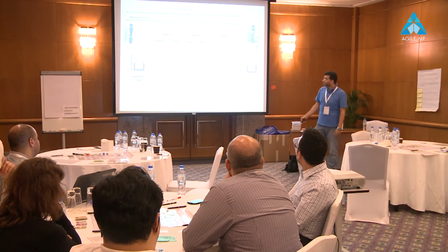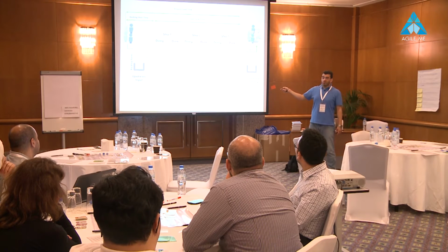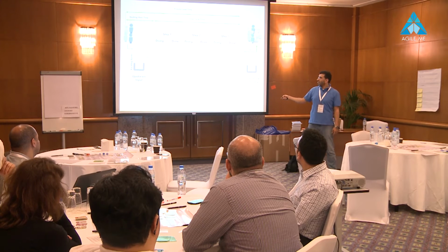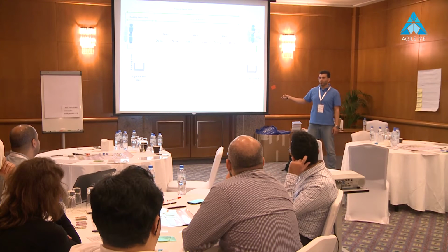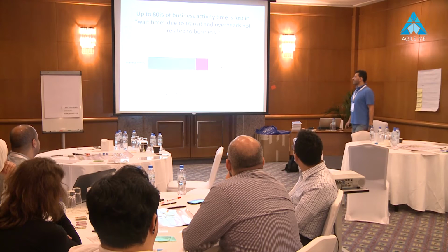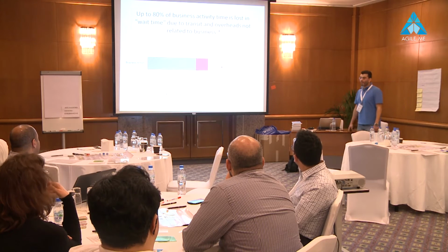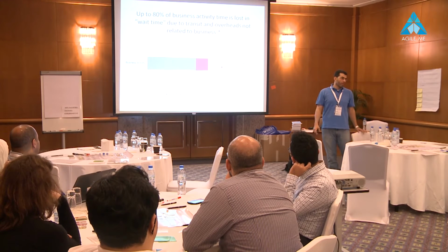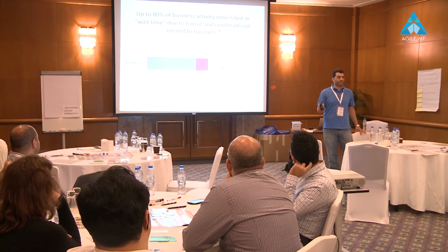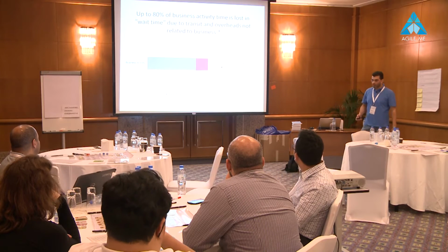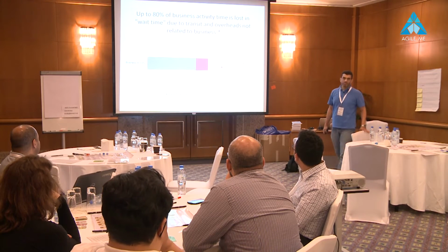Also, the backlog wait time is also wait time. It's a waste. So the customer requested a feature, and it waited here for maybe 3 weeks. So this is also wait time. Research says that wait time amounts to about 80% of the process duration, typically in all businesses. This is from Gartner, one of the famous research organizations about business.